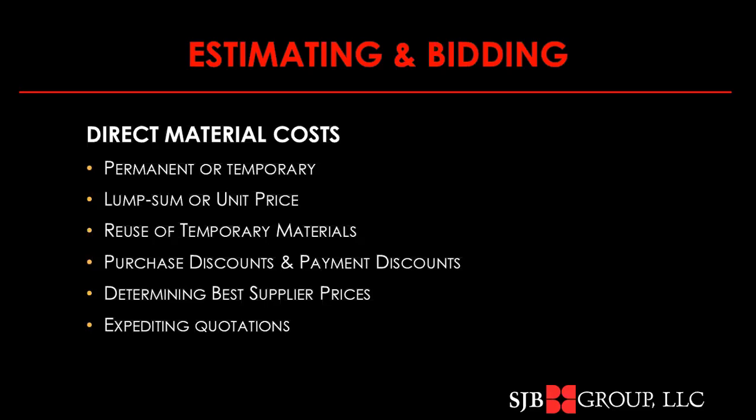Does the person providing the quote have proven financial and performance history? Does the quote include all delivery and sales tax costs? Does the quote warrant that its price is firm for some period of time? And does that written quotation provide any favorable terms? For example, early payment discounts and those kinds of things.